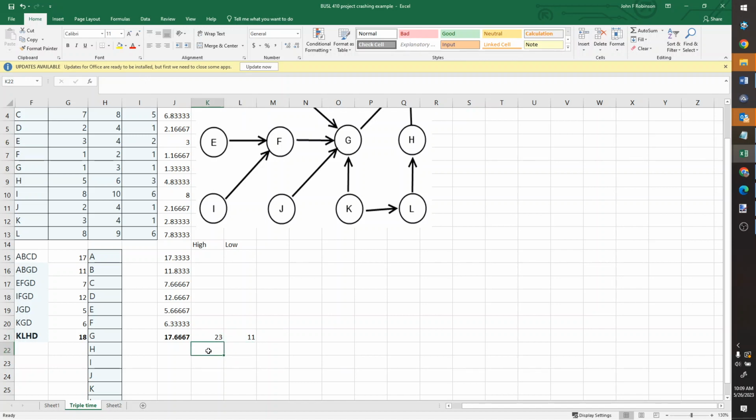Here's the thing, though, right? This was a 1 out of 100 chance of getting 9. 1 out of 100. That's pretty unlikely. But what's really, really unlikely is getting 1 out of 100 bad in L, 1 out of 100 bad in K, 1 out of 100 bad in H, and 1 out of 100 bad in D. That's astonishingly unlikely.